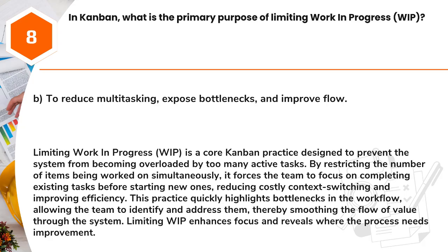This practice quickly highlights bottlenecks in the workflow, allowing the team to identify and address them, thereby smoothing the flow of value through the system. Limiting WIP enhances focus and reveals where the process needs improvement.